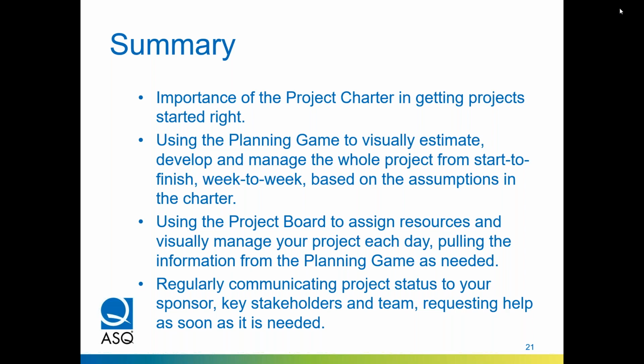Once you've broken the project down into tasks, part of the task card technique, then you lay it out week by week and use the assumptions in the charter to develop that plan. And that plan, then you start every week, the project board gets refreshed. And by the way, if things don't get done, for instance, for that week, they carry over into the next week.